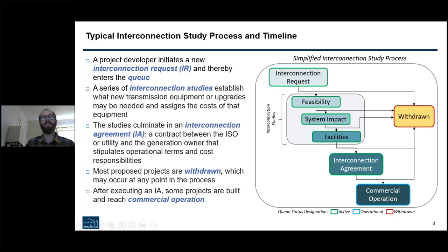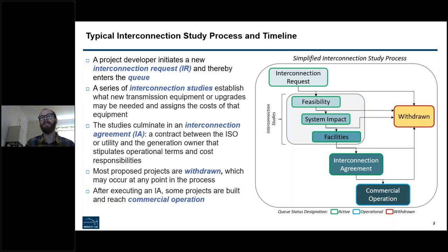As a quick bit of background for those not totally familiar with the interconnection process: a developer would submit an interconnection request and enter the queue, beginning a series of interconnection studies. Those studies are designed to establish what kind of local point of interconnection and transmission upgrades would be required to connect that new generation, and assign the cost of those upgrades. Typically, those studies culminate in an interconnection agreement — a contract between the grid operator and the generation owner. Most of the projects that enter the queue are ultimately withdrawn at some point and never built, but roughly a quarter of projects entering the queue ultimately do go on to reach commercial operations.